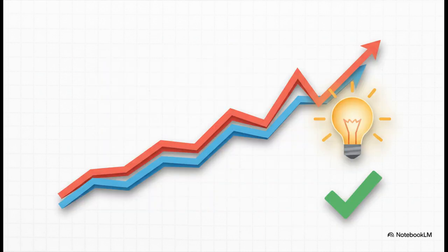Now, let's look at that exact same scenario with a Burnup chart. The team's completed work line is still climbing steadily, proving they're making progress, but you see the total scope line make a clear, sharp jump. There is zero confusion. The target grew, and everyone can see it plain as day.